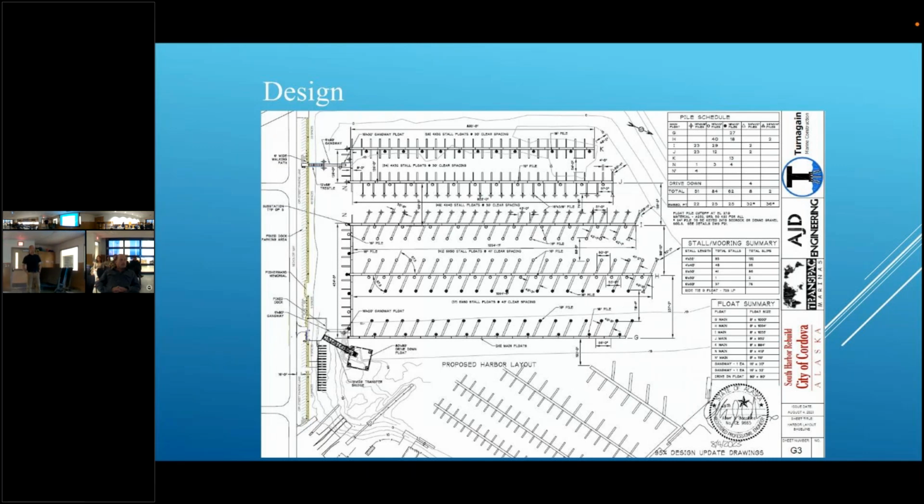Most of that cost was not the docks, it was the dredging. And the other thing, permitting, we'll get to that in a minute: the Corps of Engineers does wave modeling, and they found the waves would hit it, attenuate, bounce back off, and be too much for the rest of the floats. It would magnify whatever wave or swell. It's hard to believe there's any in there, but they're smart people. They said you're going to cause more problems than you fix by putting a rigid steel seawall in there. So that got axed.